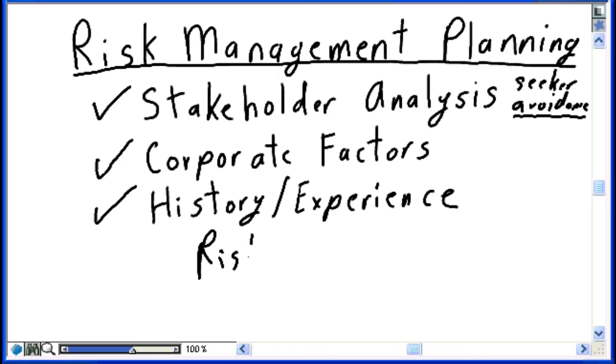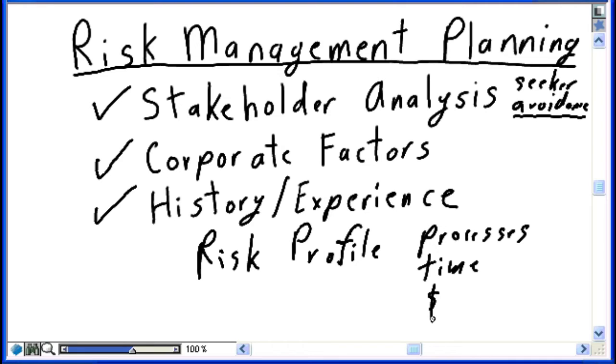Once you determine the risk profile, is your project going to be a risk-seeking project, willing to take risks to achieve goals, or is your project going to be risk avoidance? You can then build the appropriate processes, the appropriate time, and the appropriate financial allocations, the appropriate dollars, into your overall project plan to ensure that you're treating risks consistent with how the project wishes risks to be treated. Risk-seeking means dealing with risks as they come up. Risk avoidance means ensuring that strategies are in place to mitigate and eliminate all risks before they're encountered in a project delivery situation.